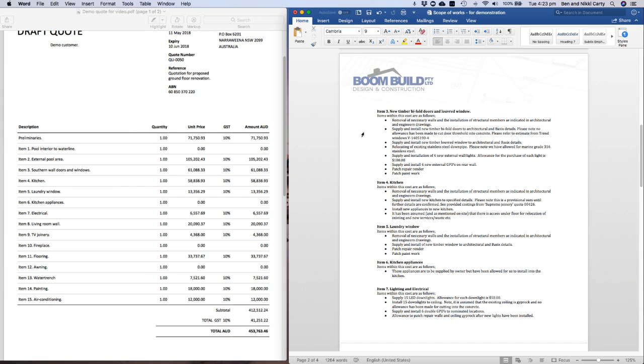So here you can see that we have provided an actual quotation from our window manufacturer, so they can see the cost and see that we're not pulling the figure out of the air. You can see that we've created it to the architectural and BASIX details. And we've also put a note in there so the client knows that we have not made any allowance to cut out any concrete to recess that door any lower than the existing concrete stands.